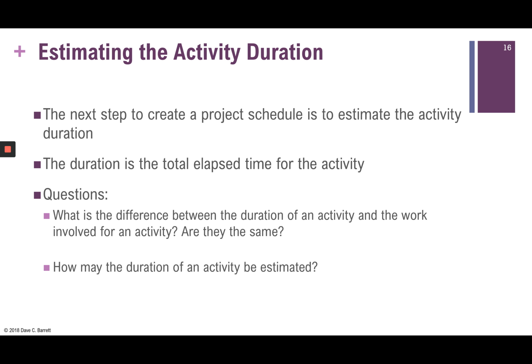This is always a tough question as well. How do I know how long something's going to take? Well, again, check your textbook, but there's various things. It's the complexity of the work, the amount of work. The other thing is the experience level of the person who is assigned. Somebody that's very experienced and knowledgeable will be able to do something faster than someone who is inexperienced and is learning how to do it. So there's many factors that go into estimating the duration of an activity.